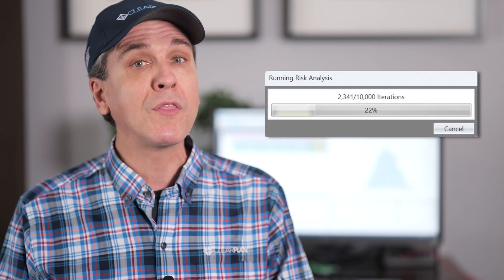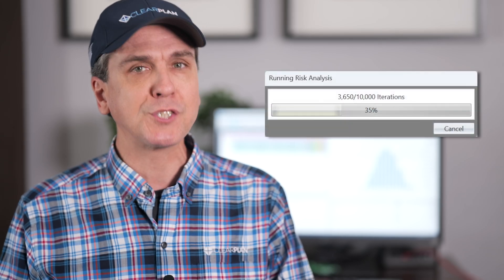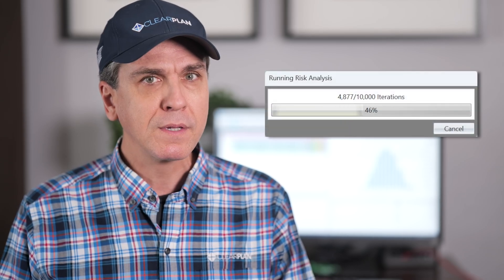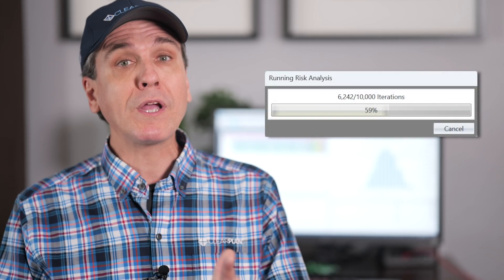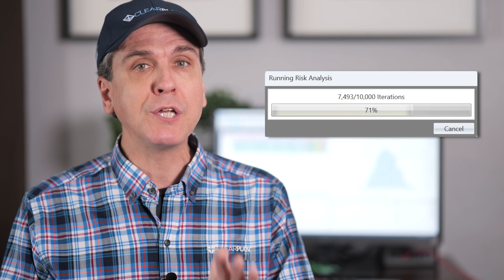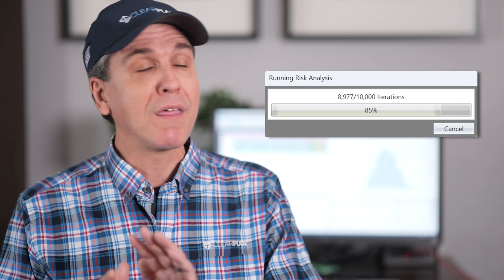Once uncertainty is established and risks are defined and mapped to the schedule, it's time to run the Monte Carlo simulation. The simulation will execute the project thousands of times, each time assuming that uncertainty impacts the schedule differently and that certain risks will or won't happen based on the probabilities and impacts that you've assigned to each risk.